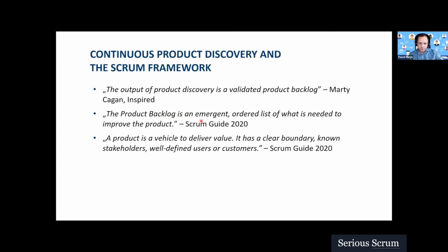And it's also worth taking into account that according to Marty Cagan, the strong teams test 10, 20 or more ideas every week. So it's an enormous number of ideas. For each idea, there are even more ideas that we generate but do not test. So it can be a mess if we put every idea that was discovered during customer interviews but is not validated, if we mix it with the things that we actually plan to work on.